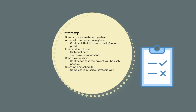We also need to understand our cash flow. If you've ever done any finance, you'll understand the concept of the cost of capital. Basically, what this means is that if there is a delay between incurring costs and getting paid, we'll have to make up this by sourcing capital from somewhere. Sourcing capital incurs financial costs. Therefore, we need to complete a cash flow analysis to ensure we are going to be cash positive, meaning our revenue will be coming in to cover our costs. We ensure we are cash positive by strategically filling out the pricing schedule — we want to front-load items like mobilization. We also need to logically spread our indirect costs across our direct costs. The pricing schedule may also be used as a basis for including or de-scoping items in the future.